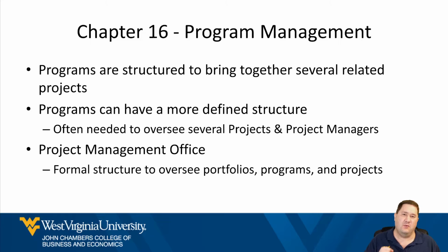That way you can say, okay, we're going to do a renovation program, but you have a project manager that's doing the emergency room, one's doing an operating room, another one's doing the executive suite. It's all renovation, but you have different people managing it. So if you put them under a program and just call it the renovation program, now that one program manager can oversee all the renovation. And the portfolio is just the same thing, just a level up. So that's really the more strategic level. At the portfolio level, they usually oversee several programs and can have independent projects underneath them.